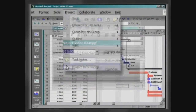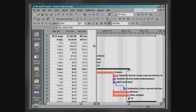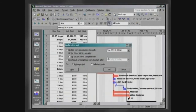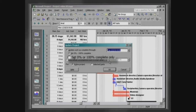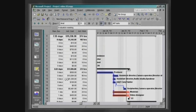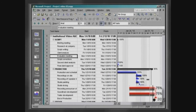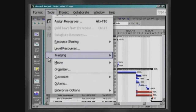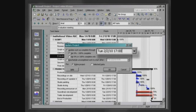We will again update the project on the date of February the 2nd. Click on Tools, Tracking, Update Project. In the field Update Work as Complete Through, choose February the 2nd. You can determine if the project shall define a percentage of finish for the tasks, or 0 for non-concluded ones and 100 for those entirely concluded. Observe on the Tracking Gantt that the tasks to be finished by February the 2nd show a finish percentage of 75%. Return to the Update Project box and determine that the project shall update the work as concluded until 6pm of February the 2nd.